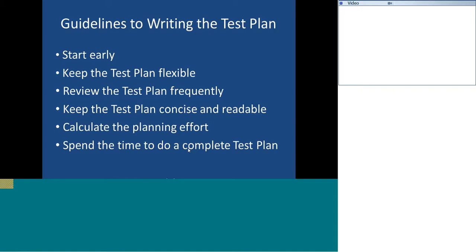They may not be baseline details, as I said, the schedule or the timeline. It may not be a final timeline or it may not be a strict timeline. You can have flexible timelines for schedules, and you can draft it as part of the test plan. And whenever you get some changes on those sections, you will make those changes. That's the reason a test plan should be flexible. And if there is any change coming and that is affecting your testing, the first point to make those changes is the test plan. So the test plan document plays an important role.